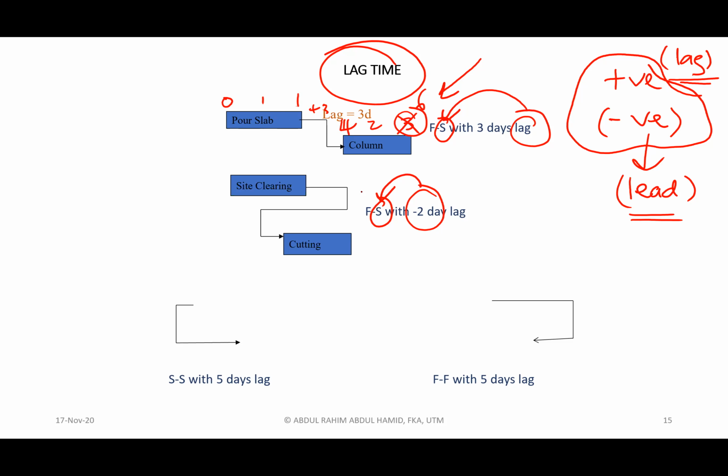Okay, site clearing normally involves the whole area of the project, sometimes very big. You don't have to wait for site clearing to completely finish in order to start the cut and fill. Once a certain portion of the area is already finished on site clearing, then at the same time you can do cut and fill.